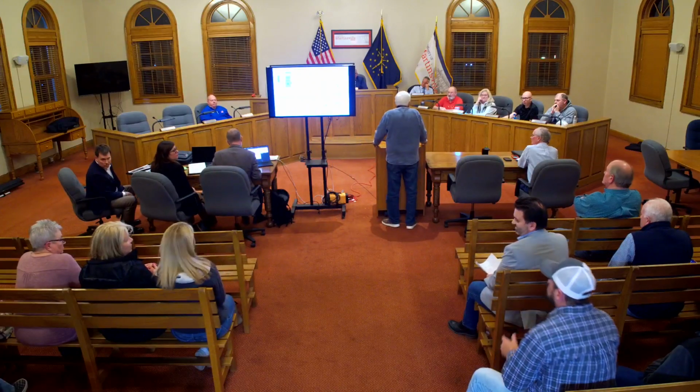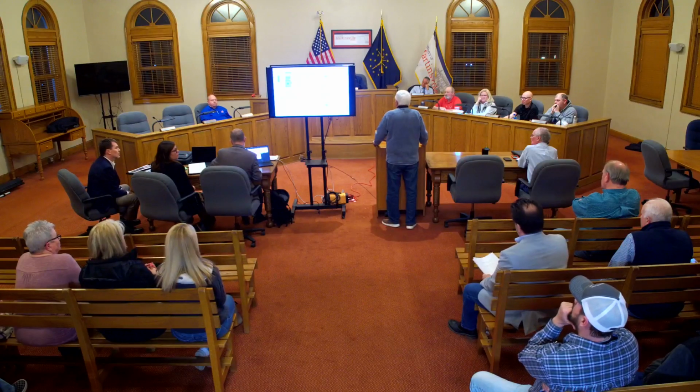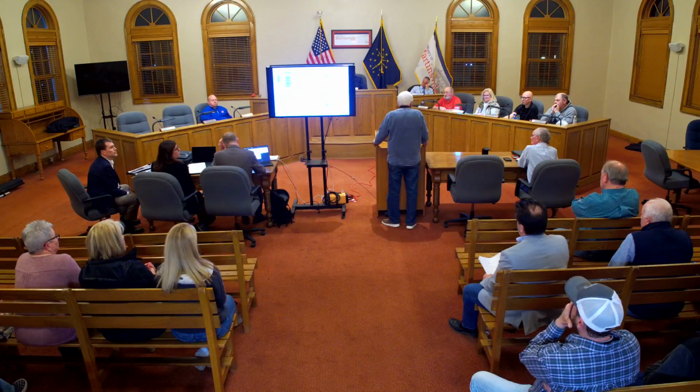That's contrary to the information we had building the police station just recently. We wanted a basement. We ended up with a basement, but they continually said it's more expensive to build a basement than it is another floor on top of here. So just so you understand, our perception is not necessarily the contractor's perception of what it's gonna cost to do. So, there's two different things out there.